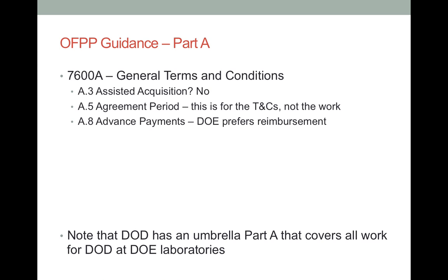Question A8 determines payment terms. DOE defaults to reimbursement, and that is preferable. If the other agency insists on advance payments, DOE can accommodate, but because this will result in manual accounting entries, projects with advances tend to have more accounting errors.